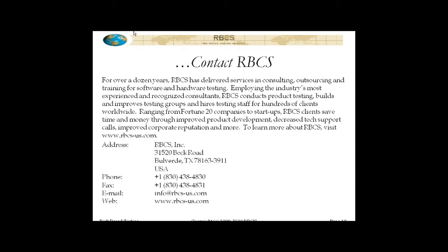And then what we do is we look and see across all of our test results, including our exploratory testing, are we finding a lot of bugs where we said that the likelihood was going to be low? Or conversely, are we finding very few bugs where we said the likelihood was going to be high? Are we finding high impact bugs where we said that the impact was going to be low? Or conversely, are we finding low impact bugs where we said the impact was going to be high? Are we finding bugs in areas that we just had no inkling about? We have no identified risks for those. Now, if any of those 5 things is true, and to some extent they will be true, that indicates some sort of problem with your risk analysis.